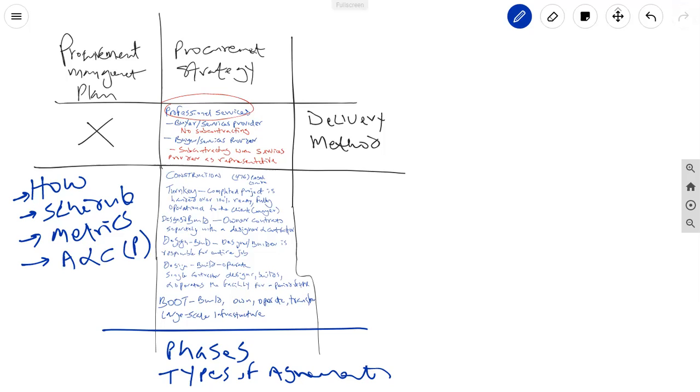It will also contain information on independent estimates. And it will also cover any information about pre-qualified sellers. Pre-qualified sellers. So I advise you to take a close look. There's a table in the PMBOK guide that distinguishes the difference between the procurement management plan, the procurement strategy, the statement of work, and bid documents. These are pretty important because they are all under something known as procurement documentation.